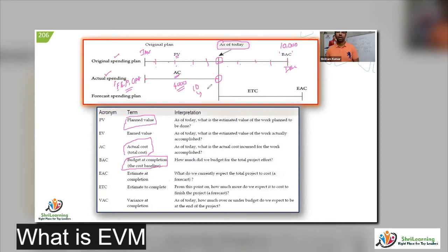Okay, then what? Last month we got a good amount of cement packs from this country. We have to pay this many dollars. Okay. Then what else? We have procured some computers from third-party vendors, so we have to pay some lease money for it. We paid it. Okay, great. So good, you tell me that 4,000 has been spent. Can you tell me, have we exactly completed $4,000 worth of work? That guy asked me. I'll tell him, hold on, I will check and come back. Now, I'll put a point here. The money you spend doesn't mean that you will get the exact value for the money in the market. Up to this, just halt.